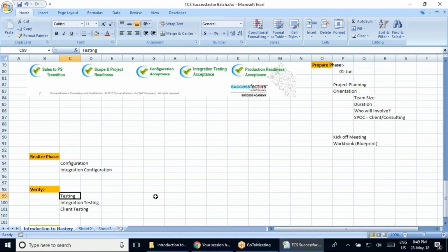So in this case, as a consultant, or as a manager, whoever is going to be the manager for this project, they will have to take a call on how much of the change they're going to accept. For example, while doing the requirement gathering, they said they will require a two-level workflow. And while testing, they found that instead of a two-level workflow, it will be better to have a three-level workflow. So all these details are going to be extra work, right? So in this case, whoever is the consultant will have to take a call.